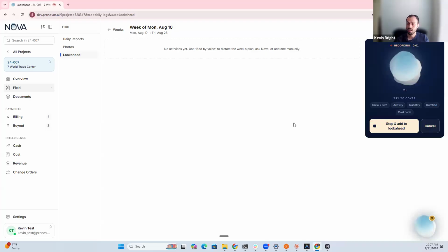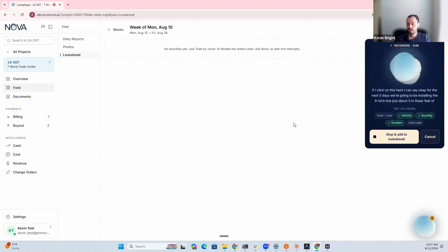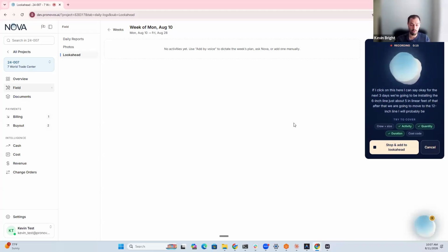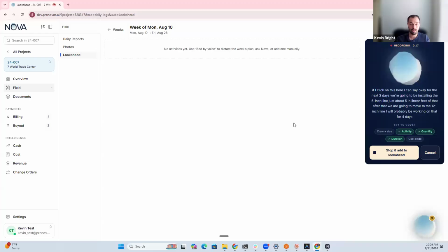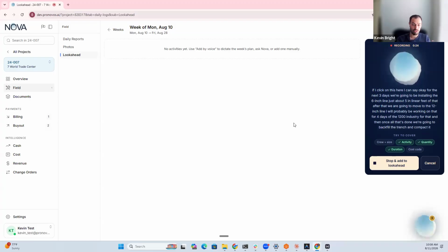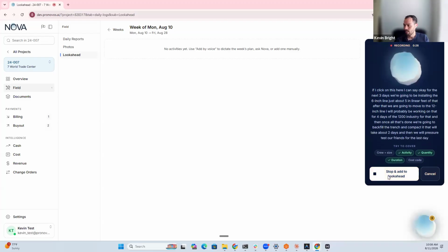So if I click on this here, I can say, okay, for the next 3 days, we're going to be installing the 6 inch line. There's about 500 linear feet of that. After that, we are going to move to the 12-inch line. We'll probably be working on that for 4 days. There's 1,200 linear feet for that. And then once all that's done, we're going to backfill the trench and compact it. That will take about 2 days. And then we will pressure test those lines for the last day.